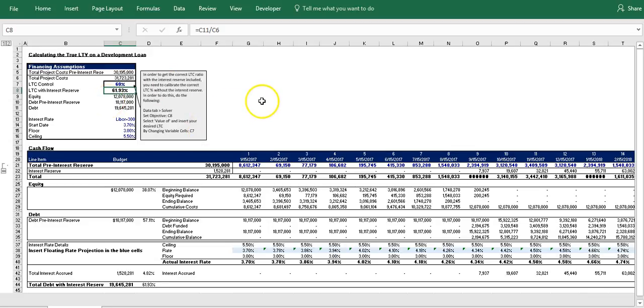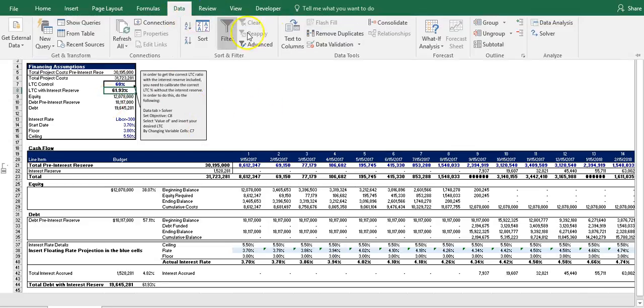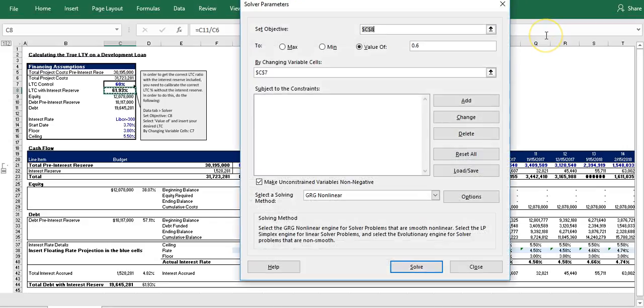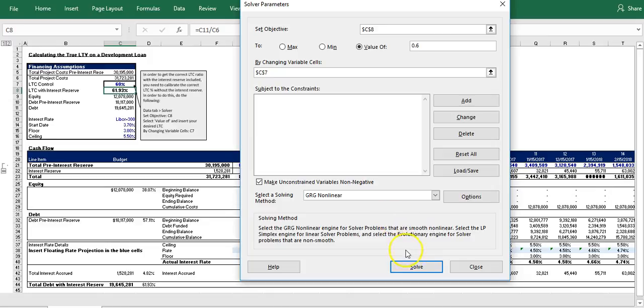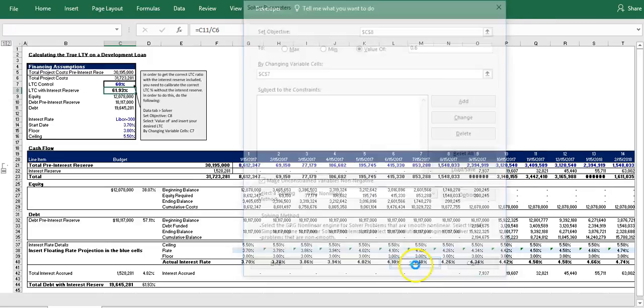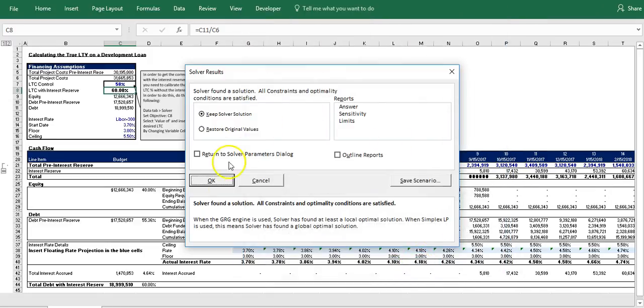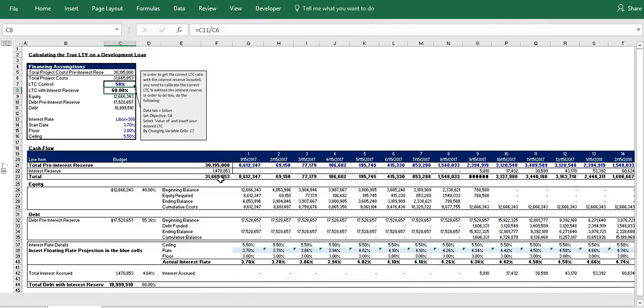And so you can do this simply by using Solver. And so we'll click on Solver. I've already pre-checked this so all the inputs are there. So we set the objective to C8 with a value of point six or 60% by changing variable cell C7, by changing the LTC control. So we'll click Solve and there you have it.